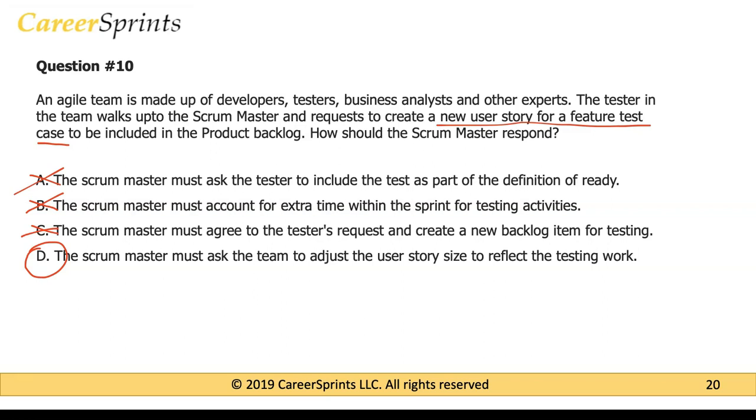Generally, whenever a Scrum team or an Agile team is picking up work for the sprint, they are going to have some time built into the sprint in case some extra work comes up. They're not going to fill the sprint up to 100% of their capacity. Maybe they will fill it to 90% or 95% of their capacity.